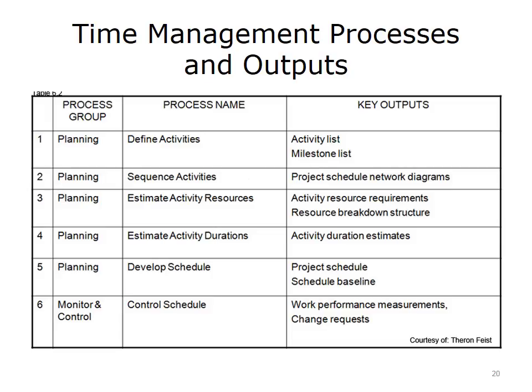The major key outputs for each of the six project time processes are indicated on this table. First, the planning process group will define activities — key outputs are an activity list and a milestone list. Second, the planning process group will determine the sequence of activities — the key output is a project schedule network diagram. Third, the planning process group will estimate activity resources — key outputs are activity resource requirements and a resource breakdown structure. Fourth, the planning process group will estimate activity durations — key output is activity duration estimates. Fifth, the planning process group will develop the schedule — key outputs are a project schedule and a schedule baseline. Finally, the team commences monitoring and controlling, involving controlling the schedule — key outputs are work performance measurements and change requests.